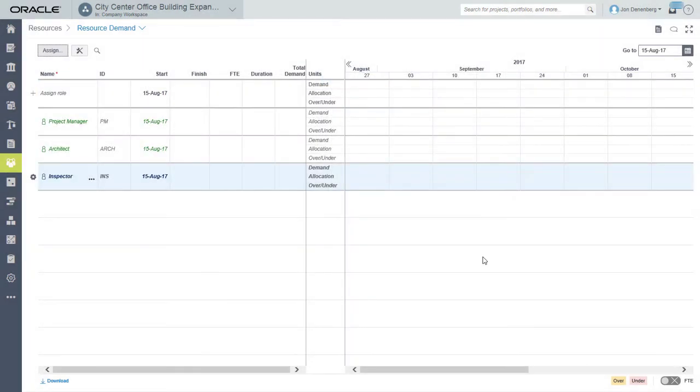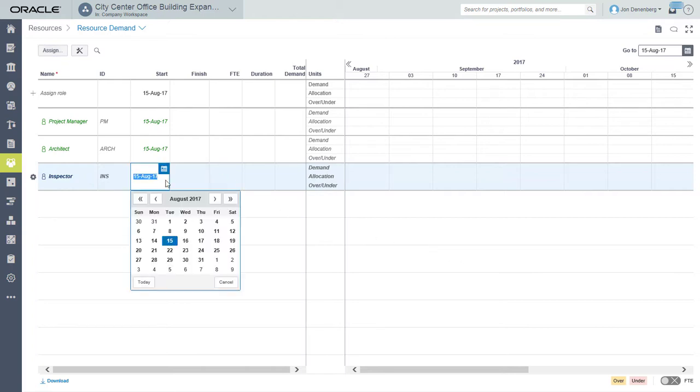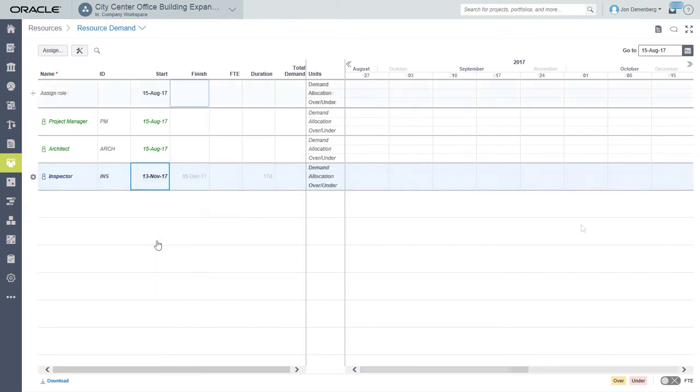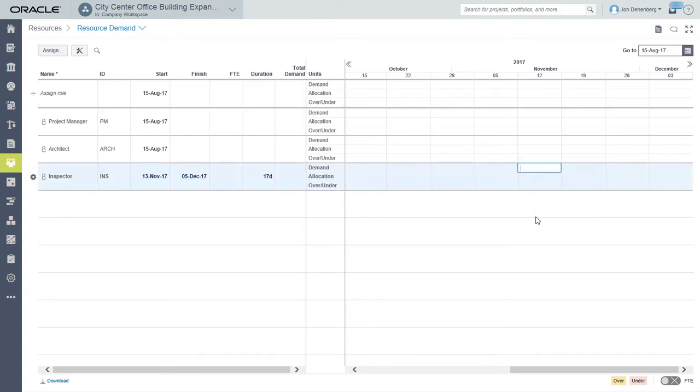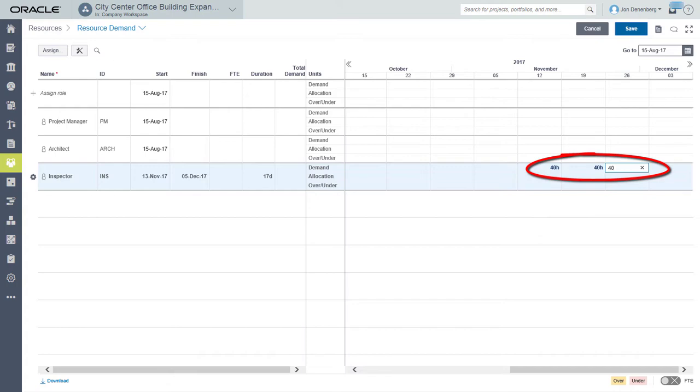There are several ways to enter demand for a role. One way is to specify start and finish dates for when the role will be needed. Select dates and then enter units directly into each time period on the spreadsheet.